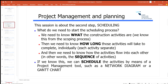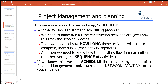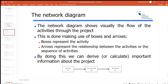When it comes to scheduling, we need three sets of information. First, we need to figure out what we need to do — that comes from the scoping process. Second, we need to figure out how long those activities are going to be, using engineering and construction background. Third, we need to know how these activities fit into each other in terms of the schedule. If we have these three sets of information, we can use a tool — in our case the network diagram and the Gantt chart. This week we're using the network diagram.